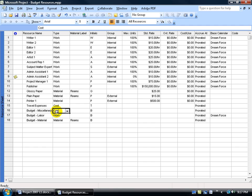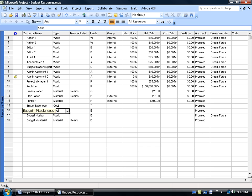I'll show you in just a minute how to assign $2,000 to your budget for your cost resources. So when you start actually accruing your travel expenses — you're at $1,200, $1,300 — as long as you're under $2,000, you're fine. If you go over $2,000, there's not going to be a red flag. The whole purpose of your budget is comparison — to say I set $2,000 aside, and you compare that against your actual cost. If we're at $2,200 and the budget says $2,000, I'd better call somebody and get more funding.